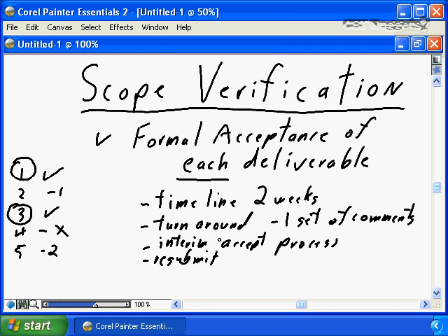As I said, at this point in time, sections 1 and 3 are not open for further change because sections 2 and 5 were minor rewrites. The expectation is they will both be accepted this time because the only areas in sections 2 and 5 that are open for further review, further acceptance, are the minor changes, and provided that your team did an acceptable job of making the minor changes, 2 and 5 should be accepted as is.